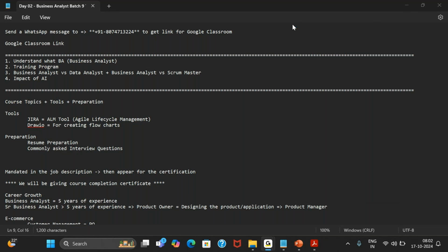Supply the action that you are going to take. If I say I cannot meet the timeline, that is not enough. What am I doing to actually meet the timeline? And if I'm not going to meet it, what's my revised plan? So that my stakeholder gets an impression that I'm not simply sitting idle, I'm taking some action.